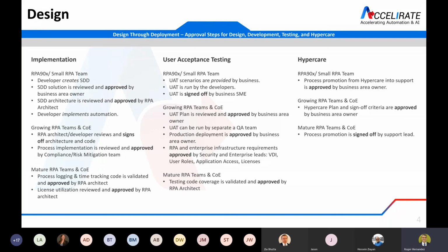At the next level, you're looking at doing a review of the UAT plan by the business owners, but also not just the results, but also, before the UAT plan gets run, an in-depth analysis to make sure that all the business scenarios, even unlikely scenarios, are being tested by the UAT test plan. So in some organizations, the business users or developers themselves run the UAT, but in a lot of places it's a separate team. So those results are evaluated after that team runs the deployment.